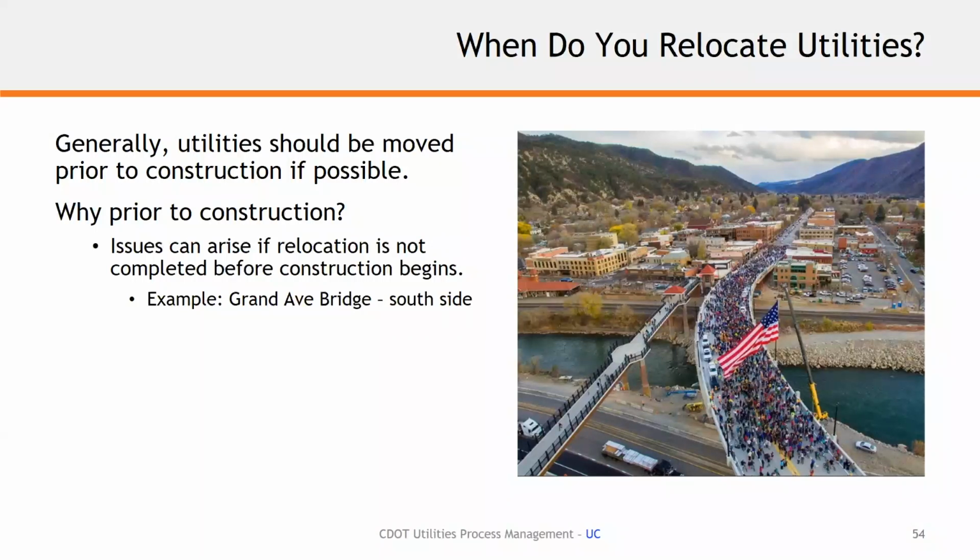And so their effort, the first early construction season for utilities, was a whole year before we actually started construction on that pedestrian bridge. But the gas company came in, they relocated, some of it was under a standard utility agreement to relocate some of their utilities, some wasn't. But the point is they moved a bunch of gas lines in anticipation of the first construction season for the pedestrian bridge, so that they were ready to go and they were out of the way for our contractor to come in and work on that first phase of the pedestrian bridge.